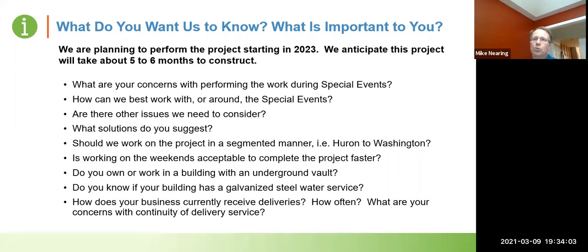As we're transferring water services from the old main to the new main, and doing water shutdowns to tie in the water mains at various locations, there will be a disruption in water service. Those water main tie-ins take anywhere from maybe 4 to 6 hours or so, and some can be done in less time.